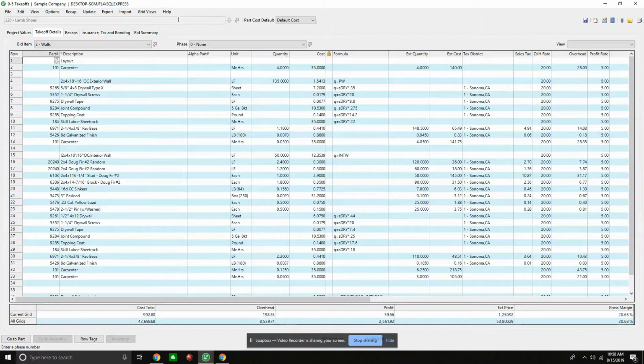So we have to have that variation, but the only way we can do that is by setting it up in the estimate. A lot of times we get calls saying, "Hey, I want to use phases," and we're halfway through the project, and I'm like, oh, it's going to be a little tough to set that up. So we want to make sure that if we're going to use phases, we do it at the beginning of the project. And of course, here are our views.